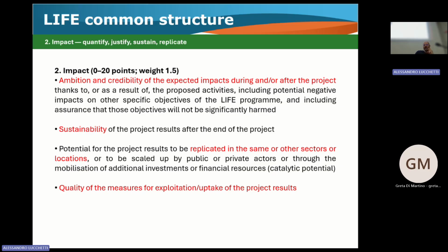Sustainability of the project results after the end of the project, usually they say within 5 years after the end of the project. You have to provide a program of this. This is the sustainability. The replicability: you have to demonstrate that your actions are potentially replicable in other areas, and if possible, you should say, we will replicate these actions in this and this country, or in this and this area, other than the areas already inserted in the project.